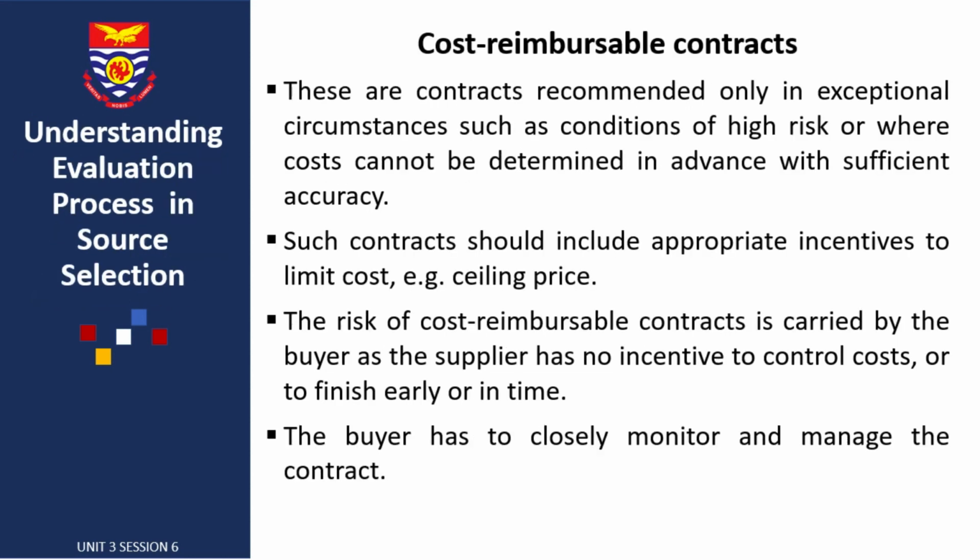And we come to cost reimbursable contracts. Cost reimbursable contracts are recommended only in exceptional circumstances, such as conditions of high risk or where costs cannot be determined in advance with sufficient accuracy. Such contracts should include appropriate incentives to limit cost.